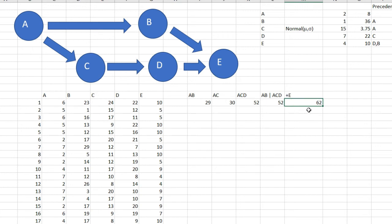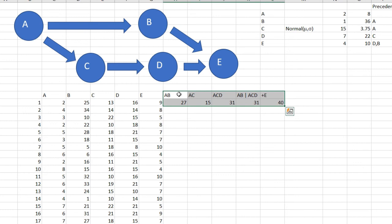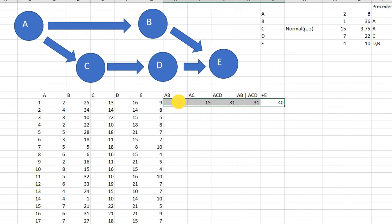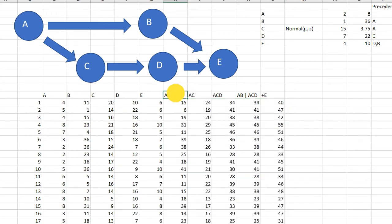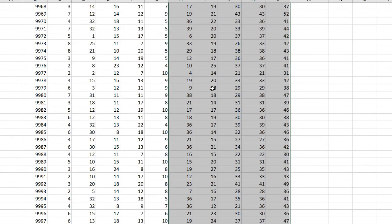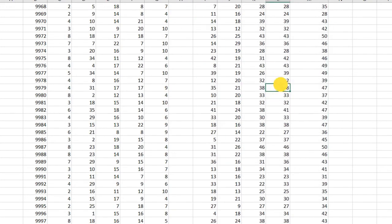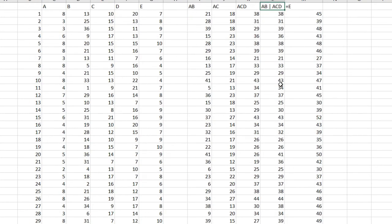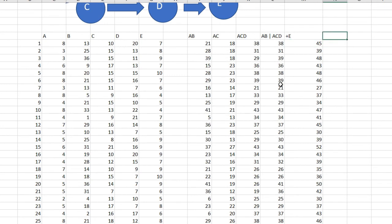This is equal to the answer plus E, which I can take from this cell which has E. Now for this instance number one I have 62 as the time of the project. All of these values I can drag, but before dragging to make it easier, shift it to the left, take these numbers, double-click.